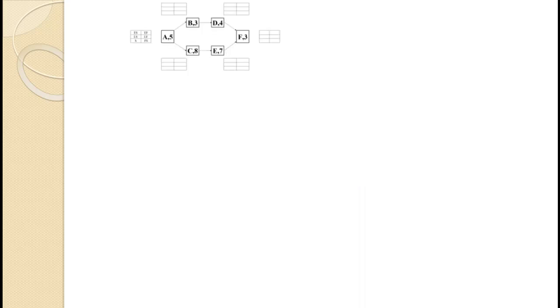The project diagram you saw earlier and see again at the top of the screen is called Activity on Node, or AON. This is because the activities are represented by nodes and the precedences by arrows. This is far and away the most common format for representing project charts. That is because it is the format used by most project software. This is the only format we will use in these tutorials.